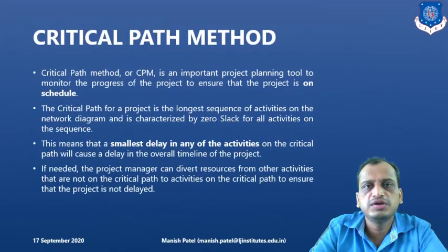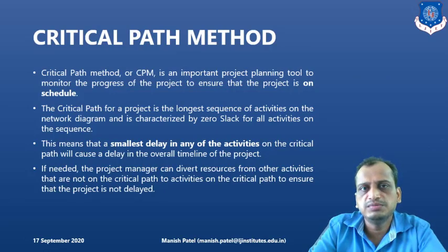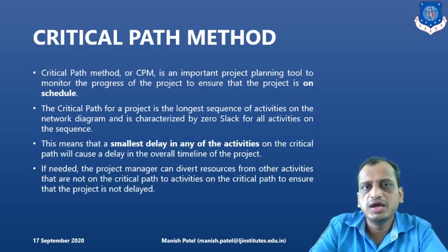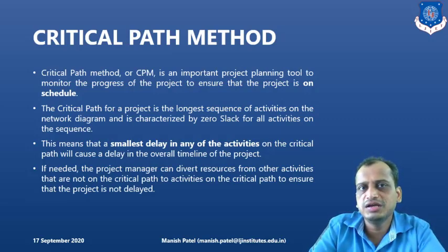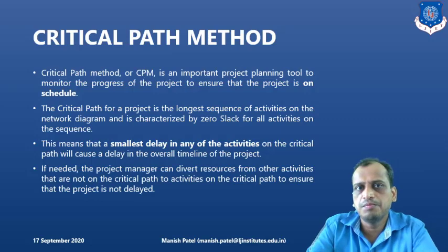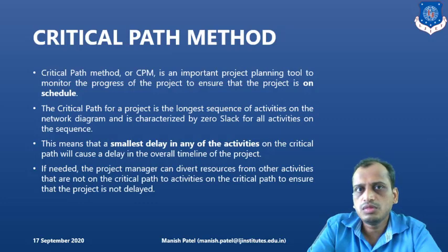So let's start with the introduction of the critical path method. What is the importance of the critical path method? What is the critical path method? See, this method is a project management tool. You can effectively manage the project with the help of this tool. You can find out the critical path, or you can say the critical activities which are involved in the particular project. So what are these critical activities? These activities take the longest time to complete, or you can say the path along which these activities lie is the critical path. And if there is any delay in these activities, it will cause a delay in the project. Right?